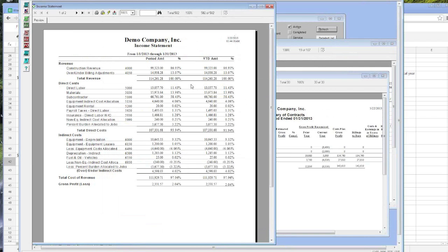Okay, so if I start a new company, for example, and I incur $25,000 in costs before the end of the month and have 0 billings, I'm going to print out an income statement. It's going to say 0 revenue, because whenever I do a billing, it hits my revenue accounts. It'll say 0 revenue, $25,000 in costs, loss of $25,000. Even though I worked hard all month, I started a new business, incurred $25,000 in costs on a project, my income statement is inaccurate because it's saying I lost money.